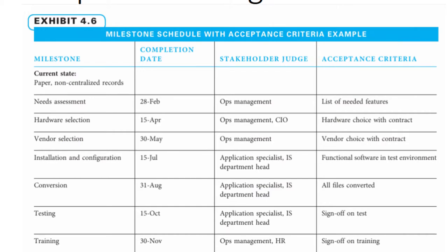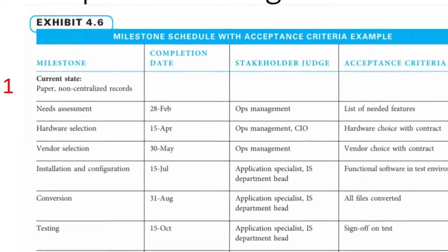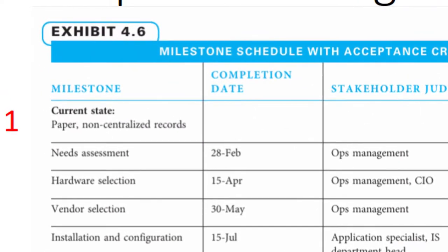In the first row, you describe the current situation that requires the project. This highlights and briefly sums up the problem — for example, something exists but doesn't work well, or a desire exists for something new. The description written in the schedule should be short but easy to understand.